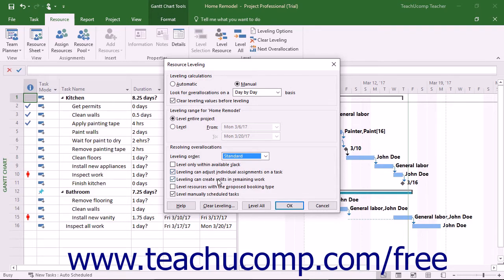You can check the Leveling Can Create Splits and Remaining Work checkbox to let project split a task or work assignment on a task to resolve resource overallocation.